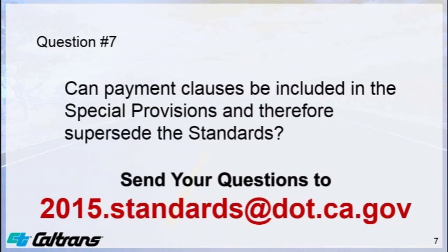Question number 7. Can payment clauses be included in the special provision, therefore supersede the standards? You are right if you look at the contract parts and what governs over what, and that a specific governs over the generals, and it says clearly in that list of contract parts what governs. So the special provision specifications will govern over the standards. And again, they should be written so that they replace, add, or delete to help avoid any conflicts.